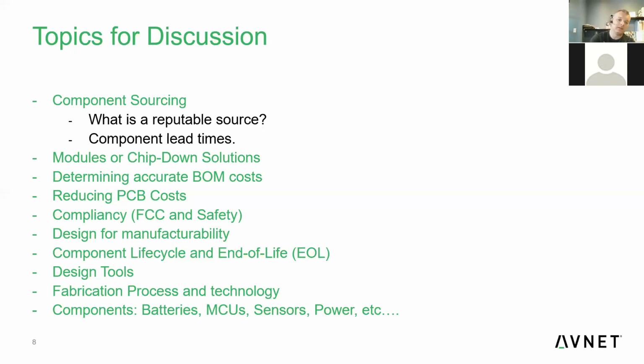The problem is, if we're selling that product to you on an ongoing basis, then we will notify you. So with Avnet, if we're your distributor and you're an established customer with us, then you will get that notification from us. But if you're ordering from DigiKey, or ordering from us but on an e-commerce type basis, then you won't get it. You've got to go looking for these things on your own. So either you're hitting websites looking for them, or you can pass it on to me and I'll do a scrub through it and see if anything is flagging in our system. But yes, there's an official end of life process.